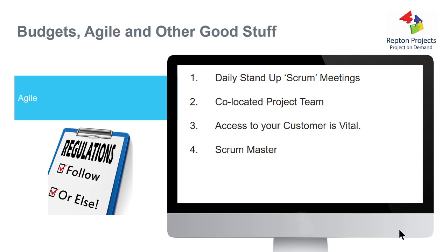If you can imagine that the customer is continually refining what the requirements are based on what we build, it's really important that we get good access to the customer. I've seen Agile projects fail quite often when the customer isn't available. They're off busy doing business as usual activity, running the business. And if we don't get access to the customer, we don't get that feedback, so we continue to build. And of course, we're not necessarily taking that feedback and building the right things and adjusting the build to what the customer is seeing going on in the business.